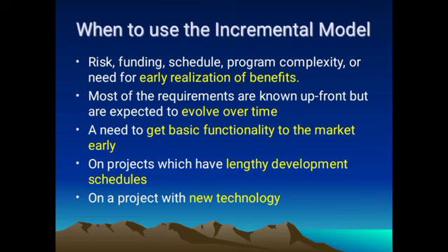When to use the incremental model? Risk, funding, schedule, program complexity, or need for early realization of benefits. Most of the requirements are known upfront but are expected to evolve over time. A need to get basic functionality to the market early on projects which have lengthy development schedules. On a project with a new technology.